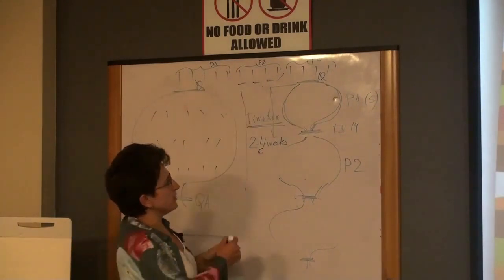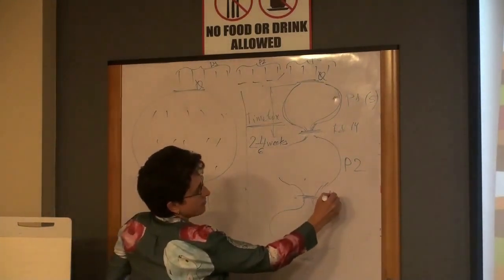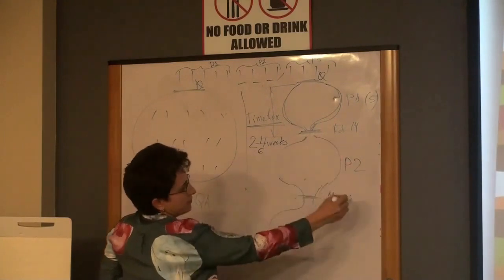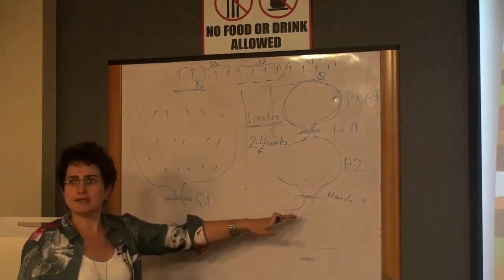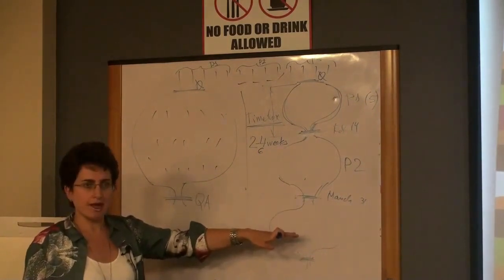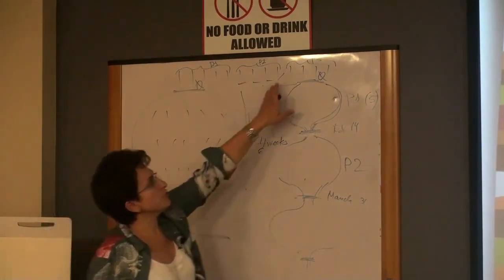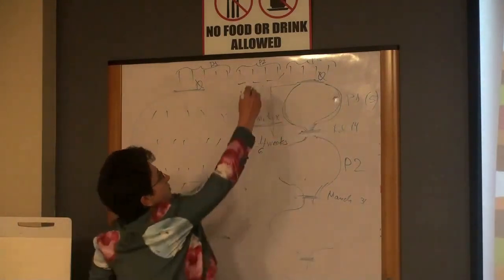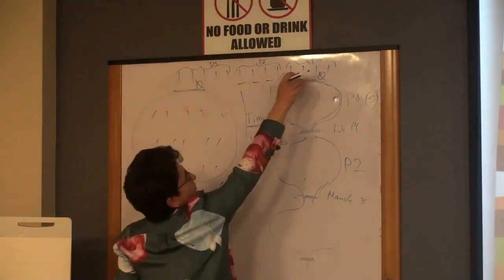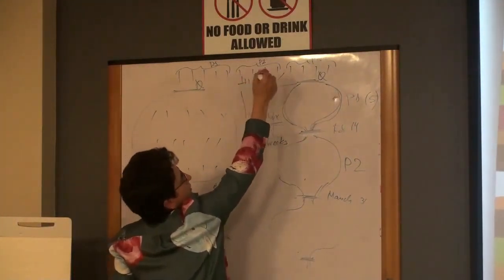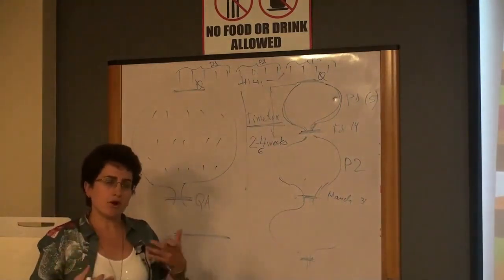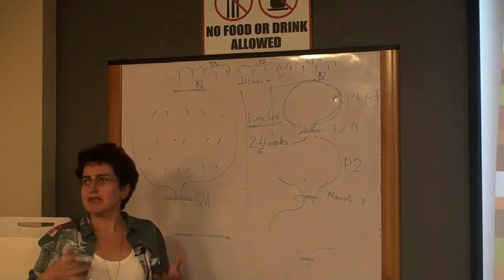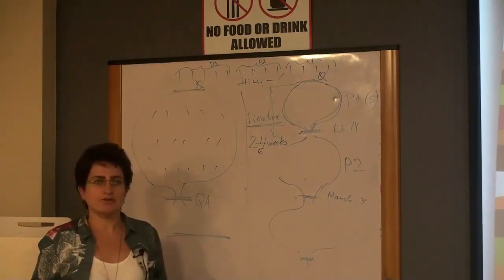And then, let's say by end of March, we are done with the second increment, we will go and revalidate the requirements again and see if the market changed again. If the market changed, we need to change these features. Or maybe some of these features were pushed down the line, then something else was implemented. Now we have time to implement those. So this process is very dynamic, but that allows you to address the market changes.